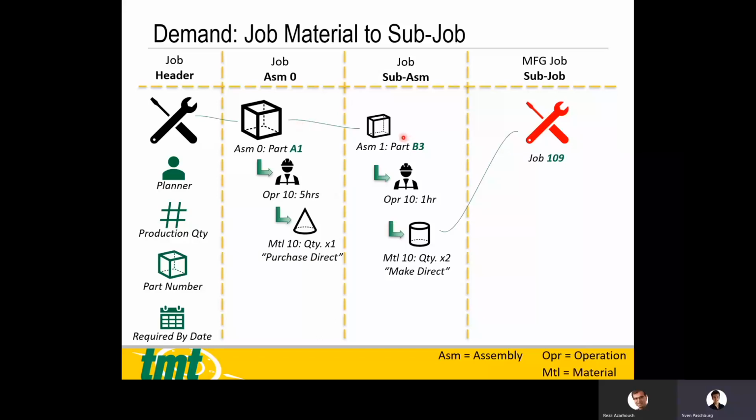If you have a sub-assembly linked to this parent assembly, then you have an operation on that level to deliver that specific item. And you may have certain things which are called materials that are used and you decided to make these in a separate job. You might do that because, for example, with more complex systems, you may want to break it down. So Malta may decide in the production department that this is quite a complex job. He puts the highest level assembly in job 1, and then he may have some of the sub-assemblies with material line items to be made in sub-jobs, and he might farm it out to different engineers.